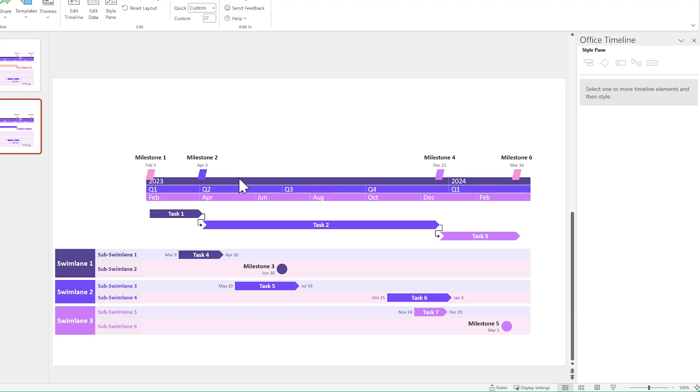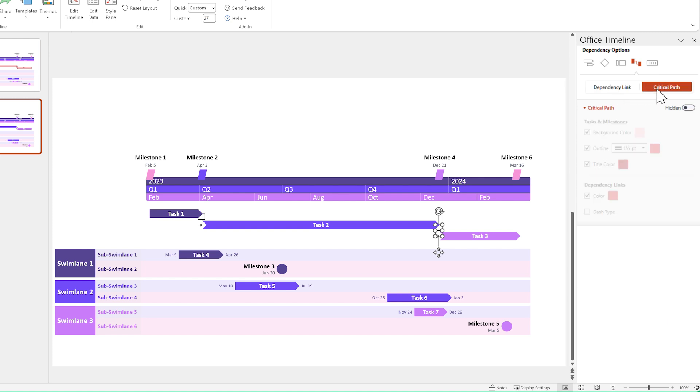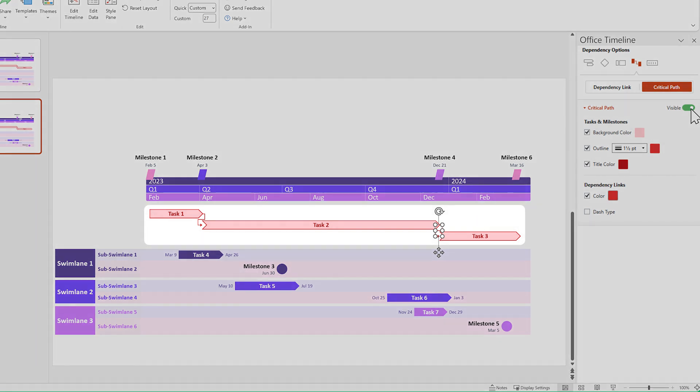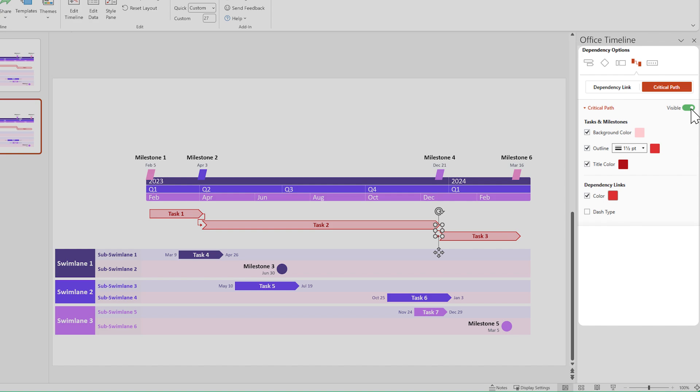Next up, the Critical Path feature. After you've set up your dependencies, make sure you've got a dependency link selected. Now go to the Style pane and switch over from dependency link to critical path, then turn the toggle from hidden to visible. You should see the critical path highlighting the chain of linked dependencies going up to your latest scheduled item. And if you want to customize the way it looks, you can do so from the Style pane. There is a lot more to the Critical Path feature that we can cover in this Quick Start Guide, so remember to check out the detailed support article we've put together.